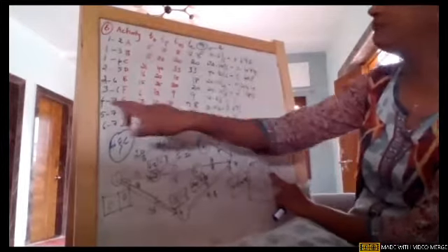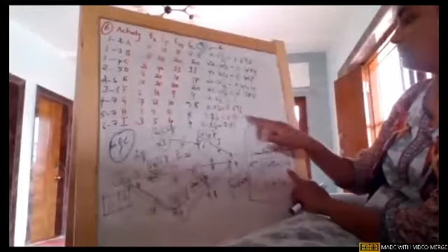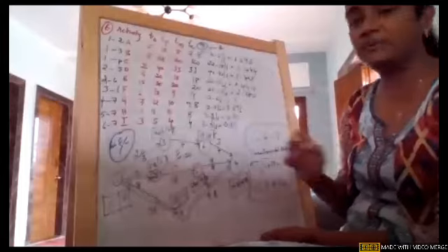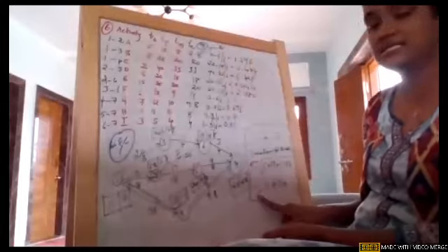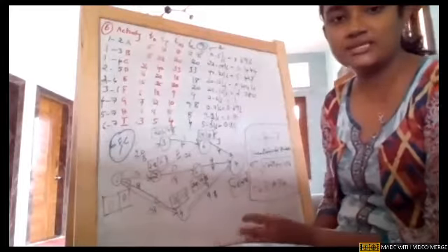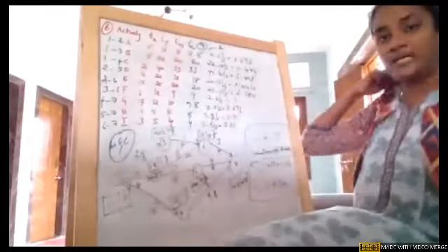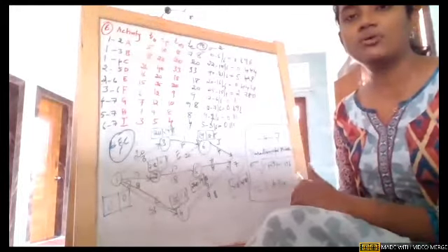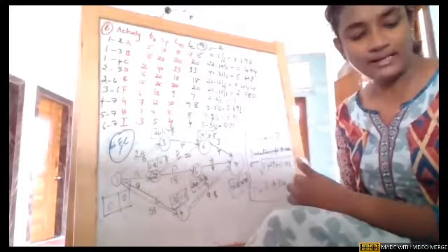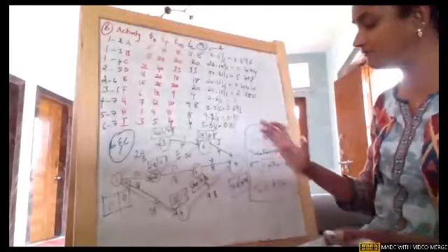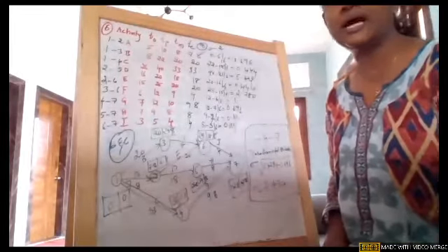For 4 to 7, the variance we got is 0.696. So we add those two and take the square root of it, because it is sigma square and here we need sigma. Understood? We need to add the variances of all the activities in the critical path, and then find the standard deviation, which we will be using in our 4th question. In order to avoid confusion, where we calculated the critical path, I did it immediately.